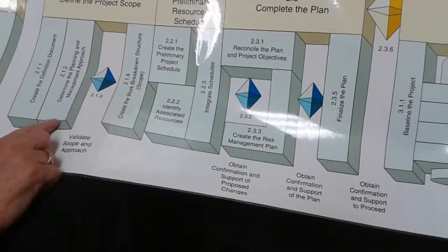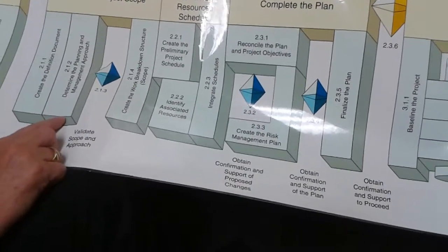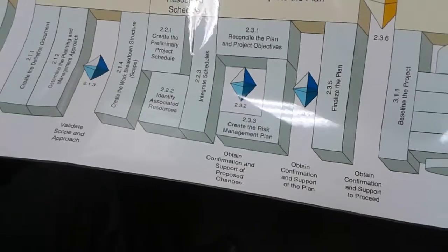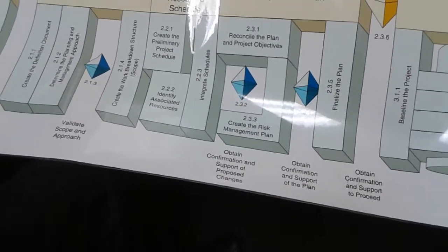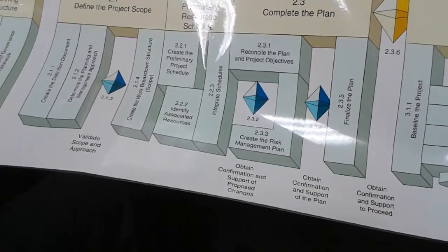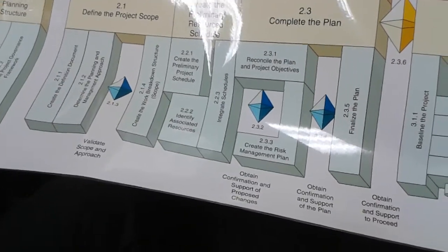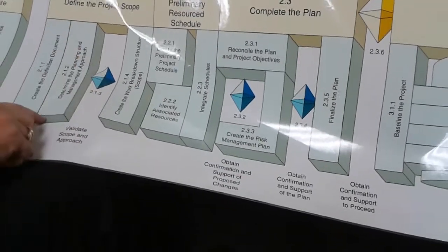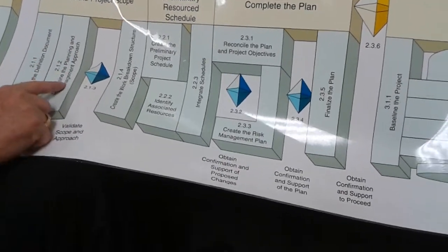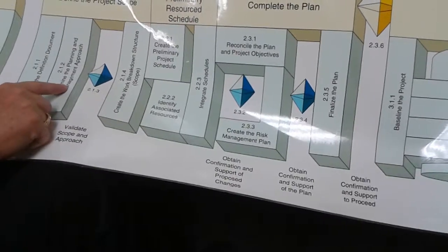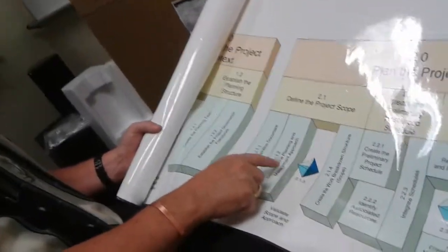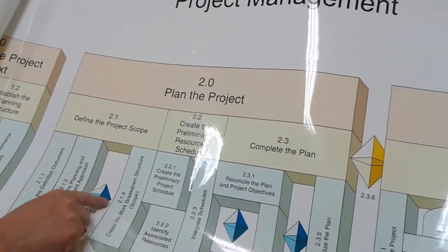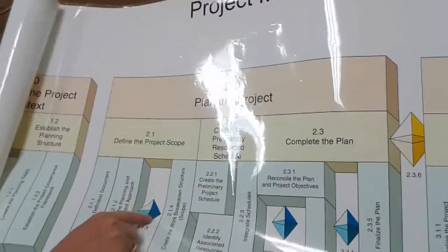And they didn't do this. They did this as a single project, when in fact what they should have done is break it up into 4 different projects. One for integration, one for building, one for hardware. They had a hardware piece they completely ignored, and one for administration. They should have had 4 projects, and they should have made that decision here, which becomes a program. This is also the step in which you decide whether you're going to do the agile approach or not. You know enough now to decide what's the best way to get this done. And then you talk to your management, you talk to your sponsor and make sure they agree with you.